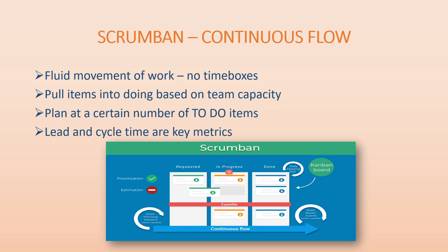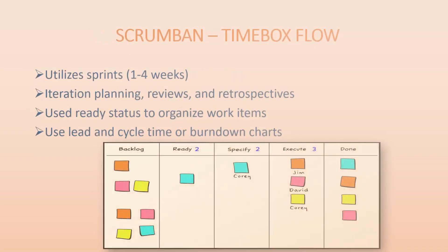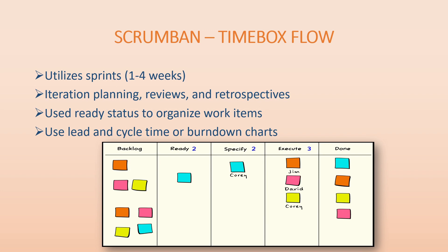The first type is Scrumban Continuous Flow, which is more like a Kanban model. It has a fluid movement of work with no time boxes, items are pulled into 'Doing' based on team capacity, and a limit is set on the number of 'To Do' items. The key metrics are lead time and cycle time. Cycle time is the total time to complete a task from 'To Do' to 'Done,' while lead time is the time from 'In Progress' to 'Done.'